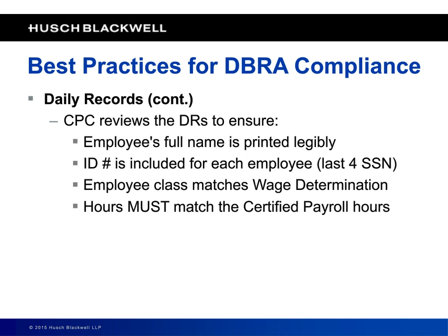So what are you going to do with that form? Well, the superintendent should get that form, and they should timestamp it, and they should look at it against their own records of who they think was on the job. And again, the superintendent is the one that's walking the job sites, communicating with the trades, monitoring and controlling their work on a daily basis.